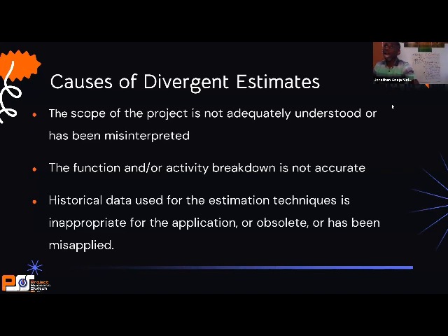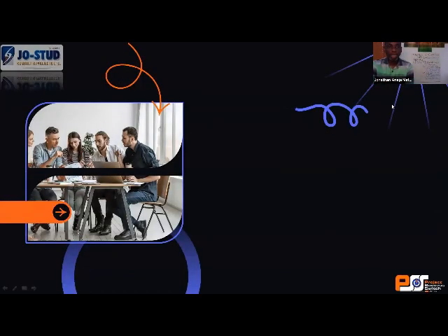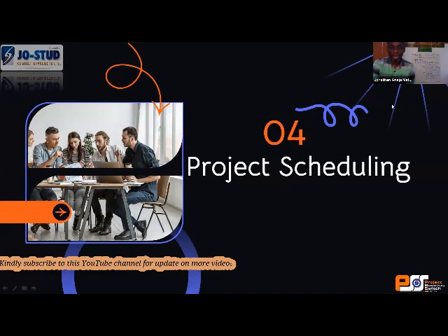Then something else that I found out was that the drain we did was two courses of 9 inches block work. So the depth of the drain we did on this site was, I think, 2 courses, about 600 mm. But the one that my QS just estimated now was 3 courses because of the terrain of the place. So can you see that my data was obsolete, and I should not have used analogous or parametric at all? I was supposed to go directly and use my bottom-up. So this is another cause of divergent estimates.